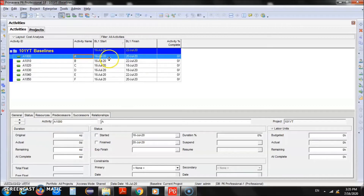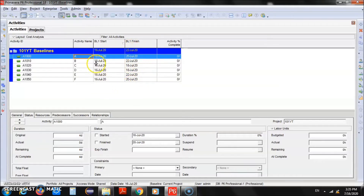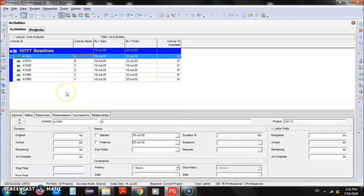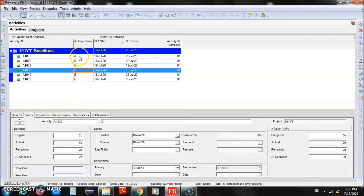Currently you can see that the dates are not accurate — all activities are starting on the same date and finishing on the same date, except a couple depending on their duration. They start on the same date because we have not developed our schedule yet. Once we have given them the durations, the next thing is to give them relationships to determine the sequence.